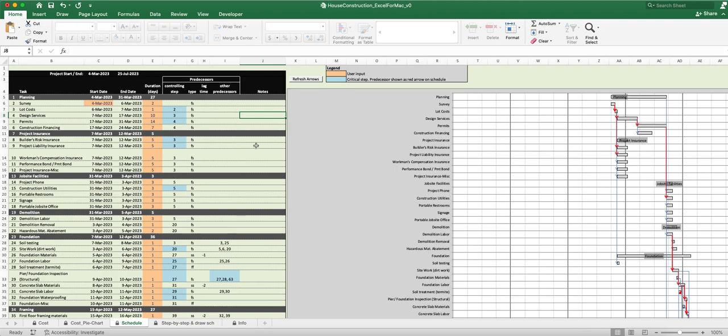And then you can see that those are right over here in the Gantt chart if you'd like to look at it graphically. So this tells you in a table, a text type idea, for each line item, what day do I need to be working on each line item? That's what you get over here on the left side. On the right side, it's more of a graphical type depiction. It's a Gantt chart if you're familiar with those. And by the way, the orange cells, that's all you input here, and then these dates are automatically updated for you.